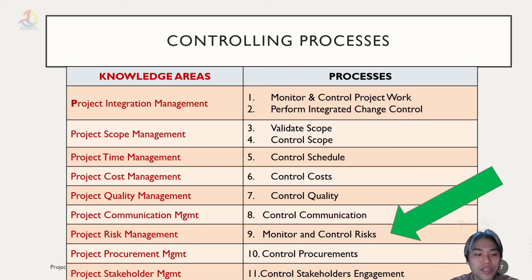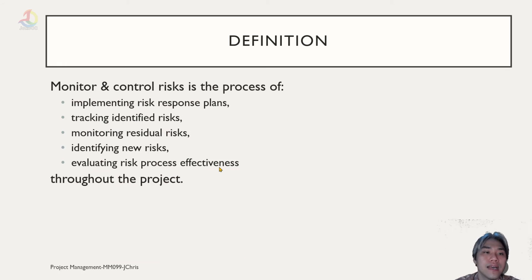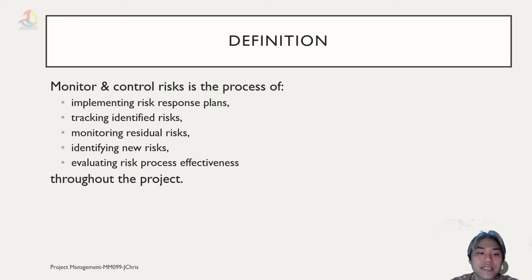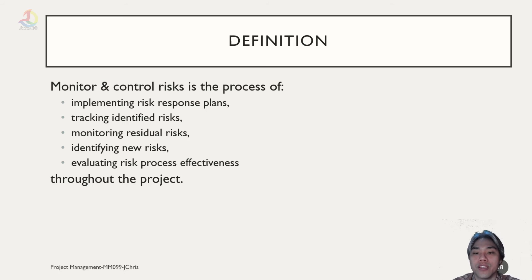The monitoring and control risk process in project risk management has one process in the control group, called Monitor and Control Risk. It is the process of implementing risk response plans, tracking identified risks, monitoring residual risks, identifying new risks, and evaluating risk process effectiveness throughout the project. This is an almost non-stop process until we can make sure there are no further risks to take into consideration.